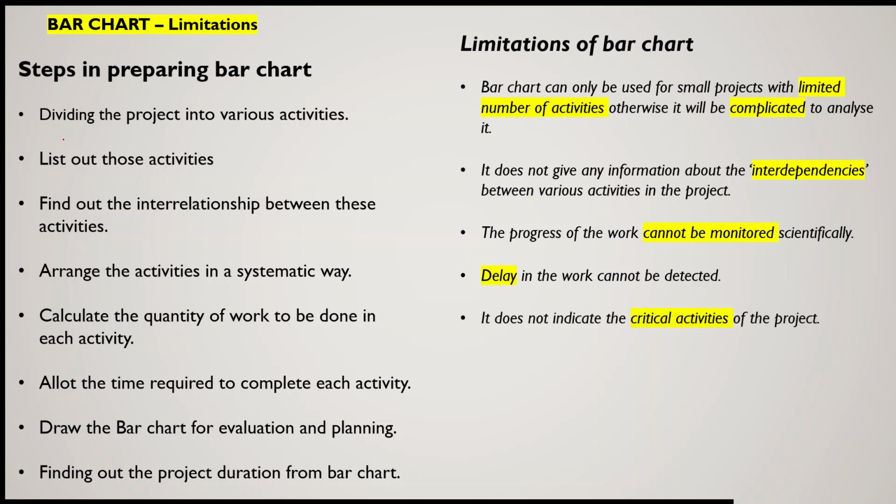It does not indicate the critical activity of the project. Now, a project may have a number of activities, and some of the activities are very critical activities. Critical activity in the sense that if that activity gets delayed, then it will influence the whole project length. That means an activity which can directly influence the project will be considered a critical activity.